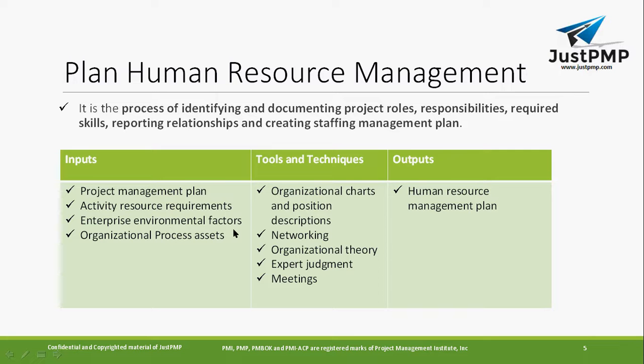Enterprise environmental factors. Whenever you're creating the human resource management plan, this is an important thing you should take care of. Like what government regulations are there? What are the factors outside your organization that can affect your human resources? For example, if your project is geographically distributed, maybe in one country the working hours are 8 hours, in another country the working hours are 9 hours. So when you create a staffing management plan, you'll create it according to that. For these resources you plan for 8 hours, for other resources maybe 9 hours. And there are different cultures and regulations in some of the countries.